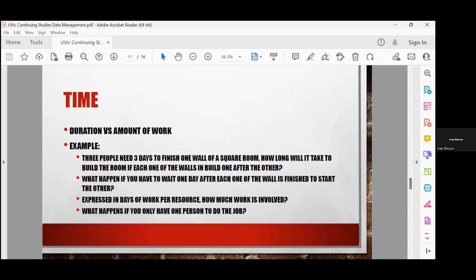I'm going to tell you something right away. That doesn't work. It doesn't work because, unless it has been a project manager and has done all the analysis, there's no way that you can just look at the project, the amount of the deliverables that you need to do, and just magically say it's like $100,000. There's something that we call budget constraint projects, which means this is the amount of money that I have and I can't give you more. Sure, we can work with that. But typically what happens in those projects is that something has to give. Either you use less resources or you deliver less things, but you are bounded by the amount of money that you are allocated to, right?